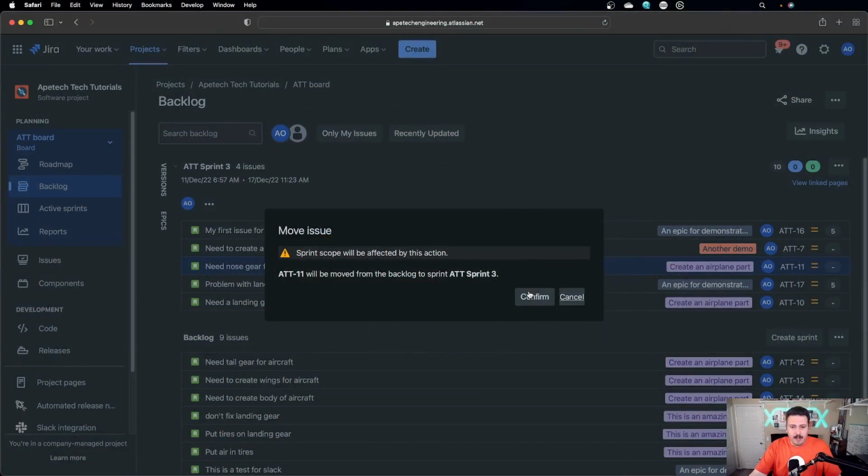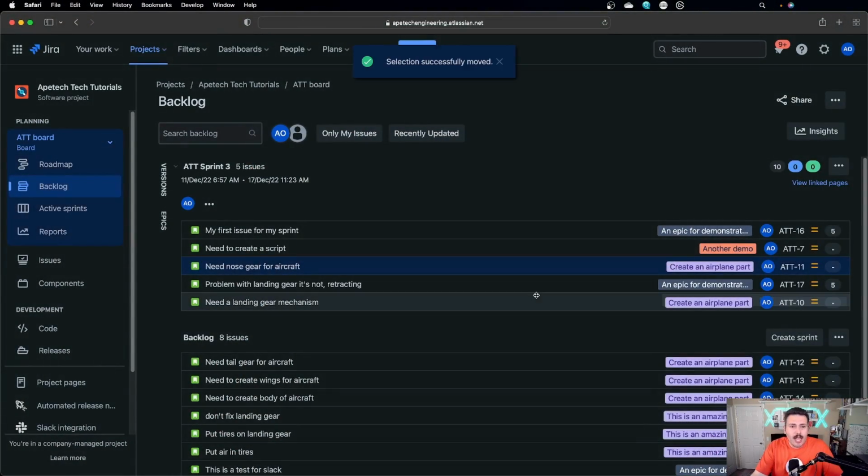It's okay to accept scope creep under some circumstances. Mainly, and my preference is, if you're going to add something to your sprint, like I am here, the conversation you need to have with your product owner is, okay, I just brought this one in. What comes out? Because this isn't magic. You just can't bring more work in and expect the same output.